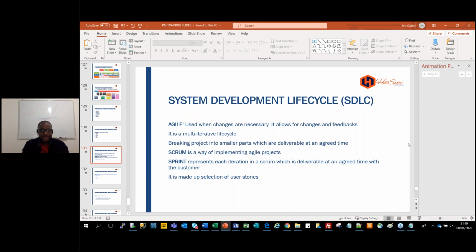In Agile, you create sprints. That's just packages, packages set to be delivered at a particular time. So I have lists of tasks, and I've set tasks 1 to 5 to be deliverable within 3 weeks, because our sprint in-house is planned as 3-week iterations, or sometimes 2 weeks for some organizations. It depends on how you plan it. But what can you deliver in 3 weeks? That's what needs to be in that sprint package.